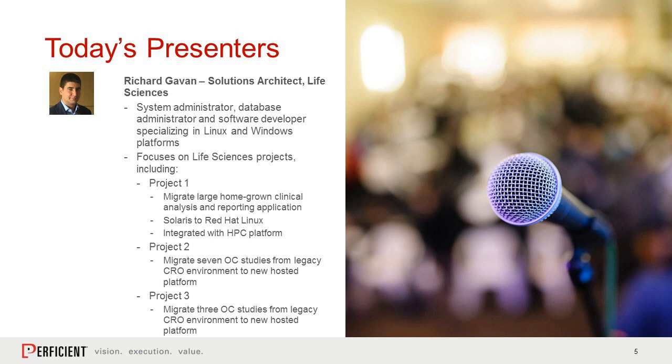For both of these projects, there were two parts. There's the initial part where we just migrated studies into a new database. But both of those clients also want to move at least one other study at a later point in time, and not just at a later point in time, but also into that same database that the first set of studies moved into. That adds an additional layer of complexity, because when you're importing studies into a live database that has existing data in it, there can be conflicts.